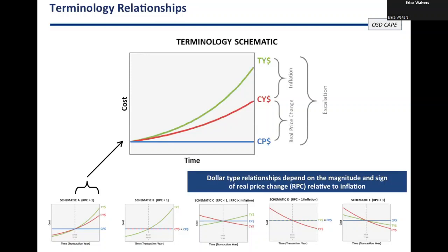And then you could look at the trends within what's left over. Or if you're doing a forecast, for example, you might want to take one point, like a subject matter expert estimate of a value, and say, what if I just stretch this all the way across every column of my Excel workbook, and I'm going to add price stuff onto it later. That would be building an estimate in constant price.